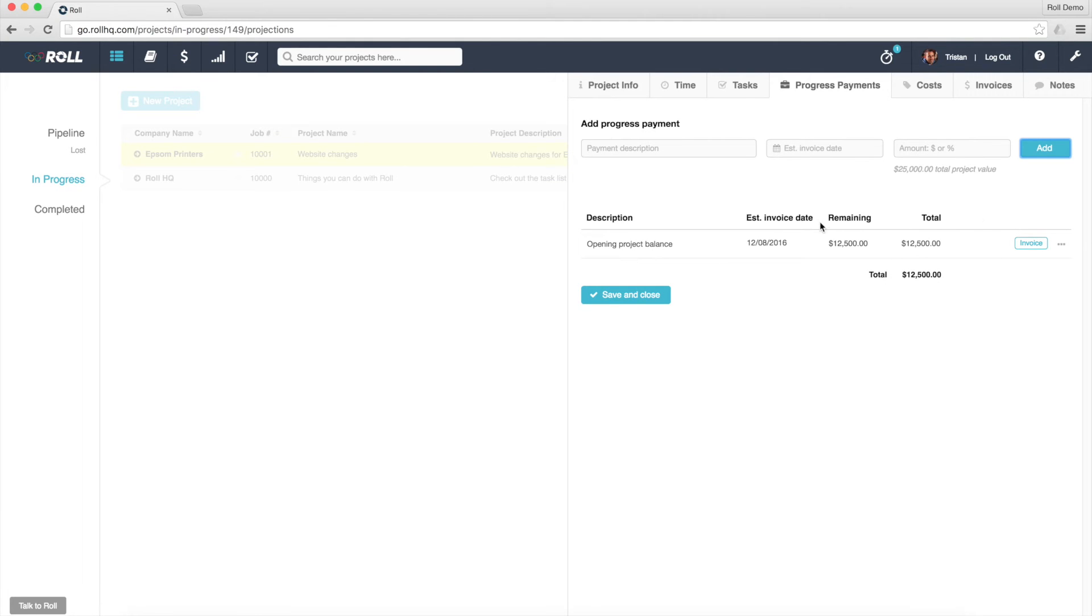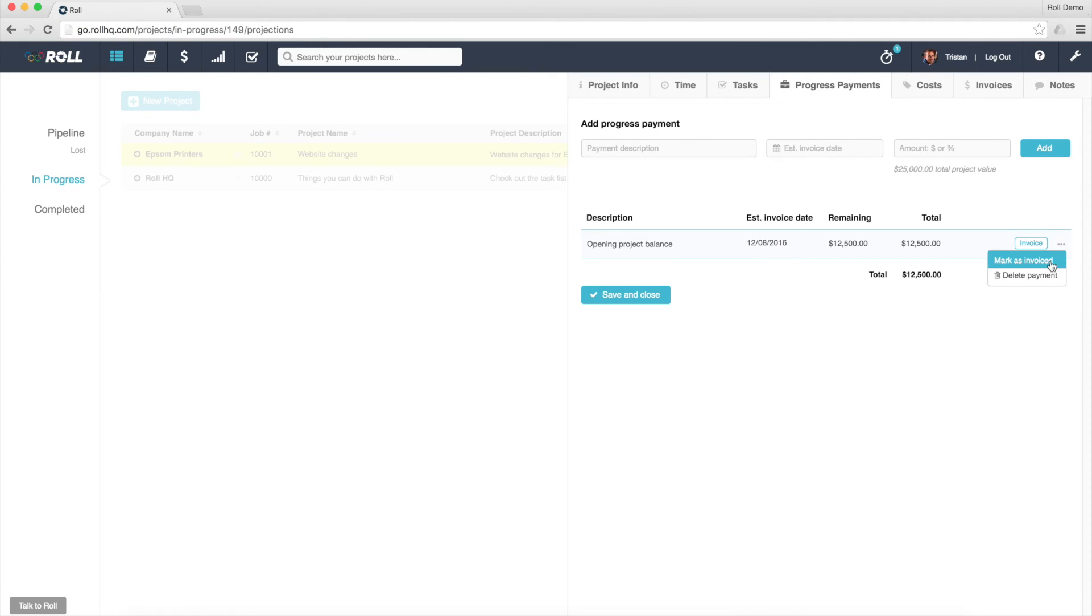So now what I've done is I've generated Progress Payments for half of the value of the project. All I want to do is I don't want to generate an invoice, but I just actually want to mark this as invoiced, and now that's marked $12,500 as being invoiced already without actually generating an invoice for that amount.